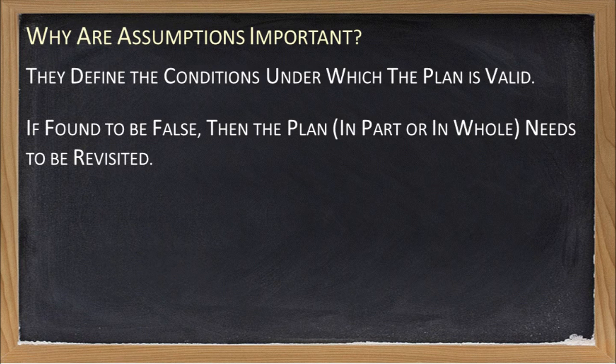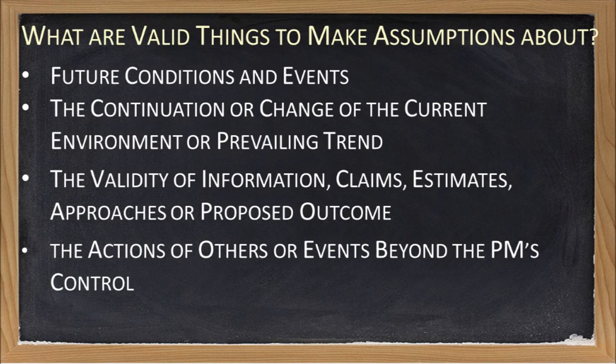If an assumption is found to be false, then the plan loses its integrity and either sections of it or all of it needs to be revisited. What are these factors that you may need to make assumptions on? If relevant to the project, then you may need to make assumptions on events that might occur or conditions that